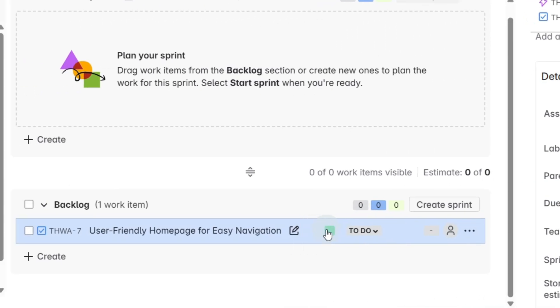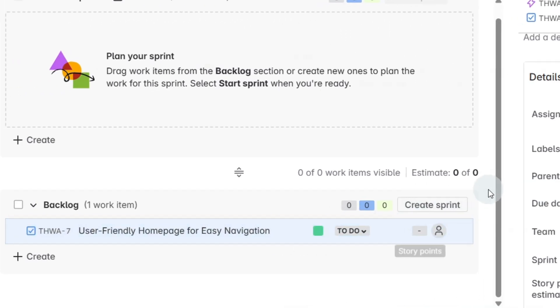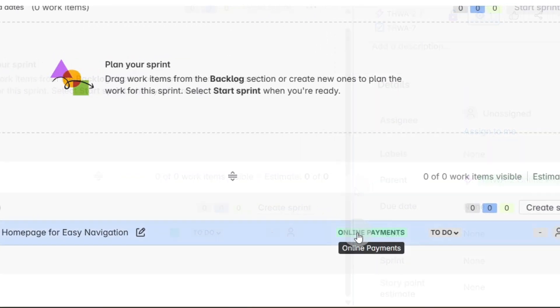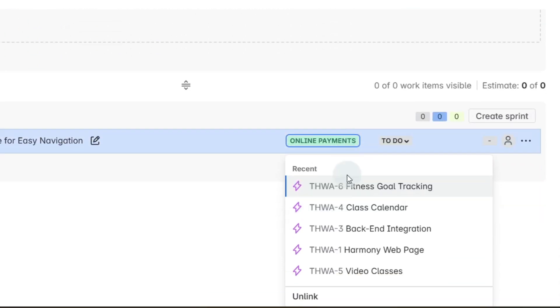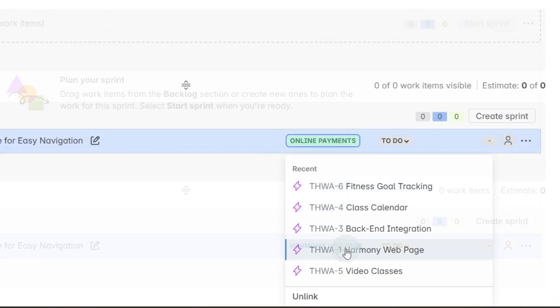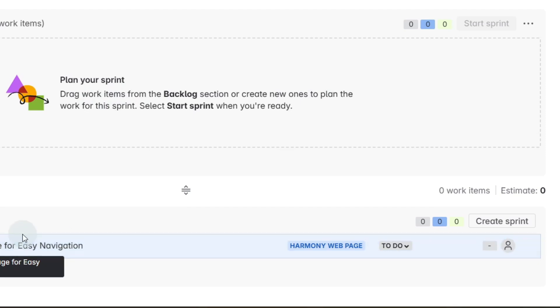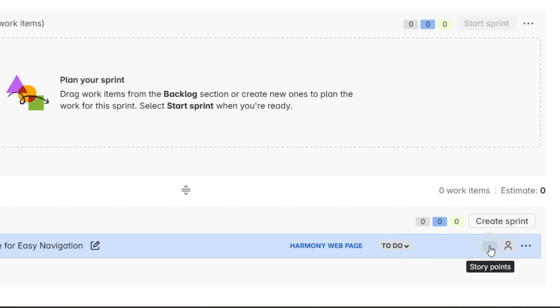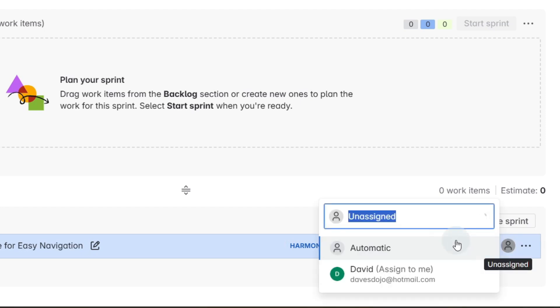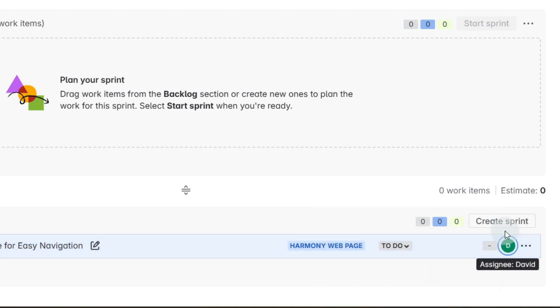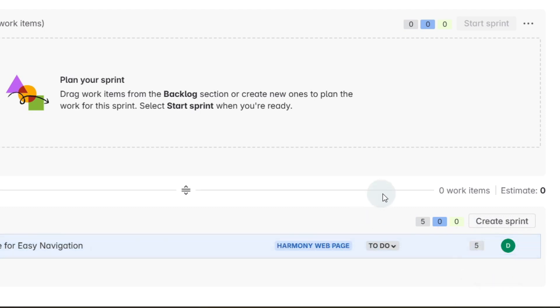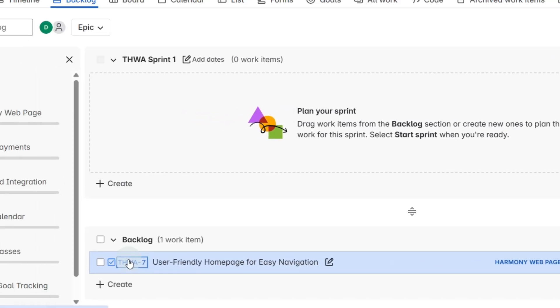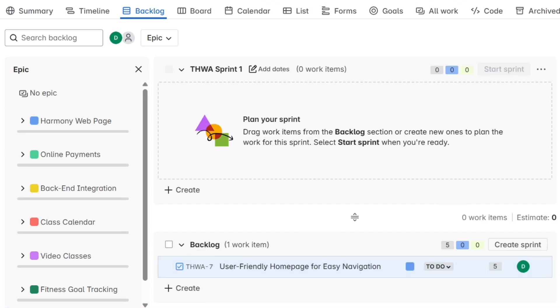Now if we click on that user story it will open up some more details so we can add more details down the side here or we can work with it in the backlog. For example the epic that we're looking at we can click on that epic and we can select a different one which is Harmony web page because that's what we're looking for, a user-friendly web page. We can leave it in to do. Now over here we've got the assignee and I'll just assign that to myself because I'm the only person in this project at the moment, and the user story points - if we click on that as a team if we decide and we estimate the effort for that particular user story, let's say we put that as a five, we can add that to the user story card.